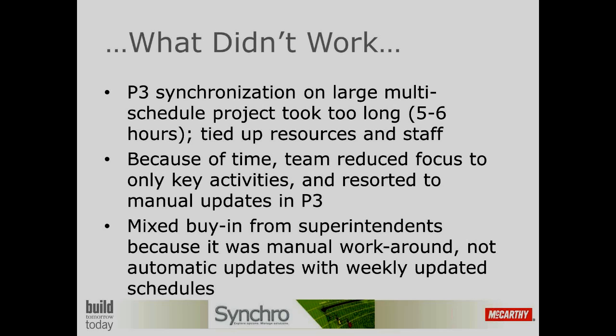So what the team ended up doing was taking shortcuts. They started focusing on just certain activities that they knew were key, using just those activities in these coordination sessions, working them out, and then having basically handwritten notes, passing those back to the scheduler for the P3 schedule to get updated. So they broke that bidirectional cycle, and it was a little bit further down the road when we discovered what was going on.